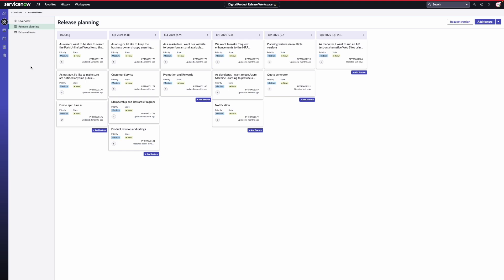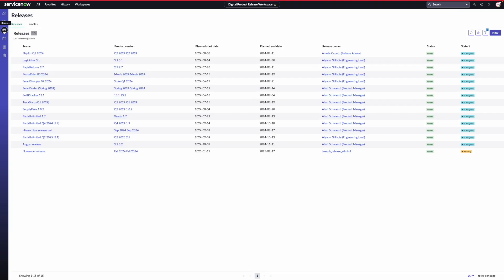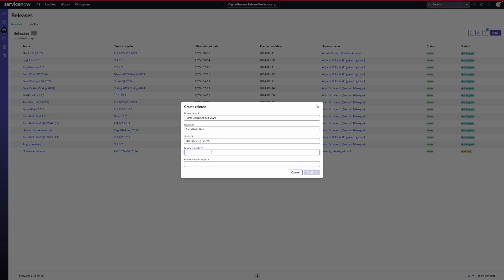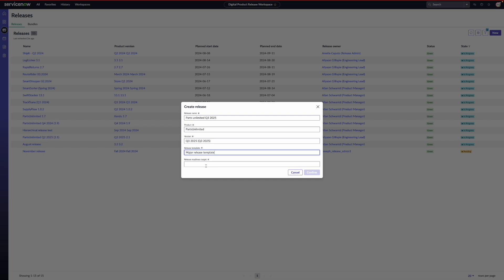For that, you navigate the releases on clicking on this icon. Here, you see list of all the releases across your organizations. You can create a new release by clicking on the new button. In the create release model, you provide a name, select the product and product version. Then choose a predefined release template. Release templates enable release managers to standardize the release process by pre-defining the phases, tasks, approvals and policies required for different release types. This allows product managers to simply select the appropriate template at the time of release creation without needing to know the specific details for each release type.